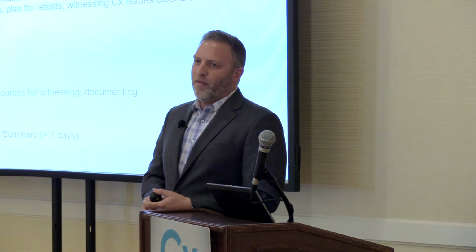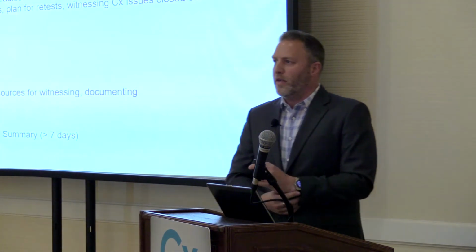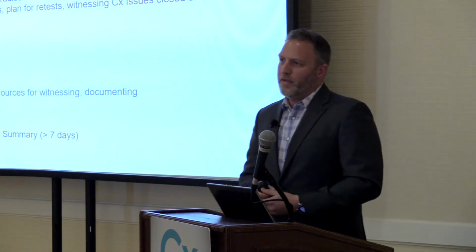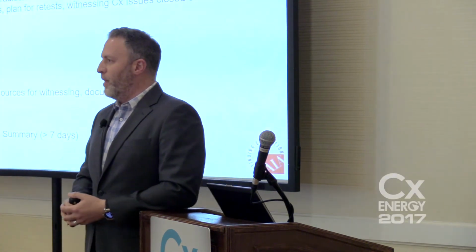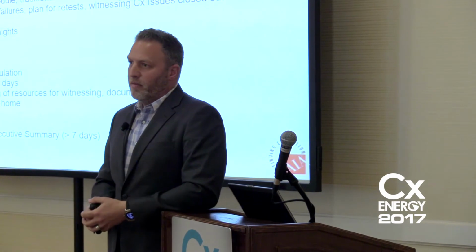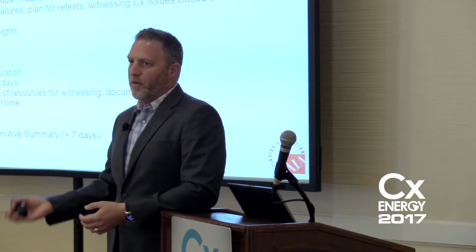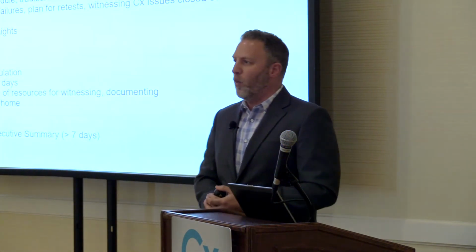More than likely you have the 5 nines rule or maybe even the 7 nines rule on your electrical power distribution. Take it to that level of failures. Fail a generator, watch it roll over. Fail a UPS, watch it roll over. Fail a singular utility, watch it roll over. Fail the full utility. While you're on emergency power, fail another generator. Watch it cascade, watch the system react and work.